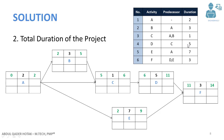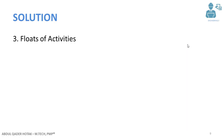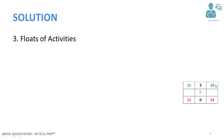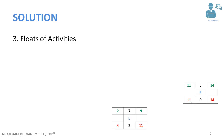Now let's go to the third part: calculate the floats of activities. In the previous step we did a forward analysis to find early starts and early finishes. To obtain the floats, we do a backward analysis to find the late finish and late start of each activity. For activity F, the early finish is 14 and the early start is 11. The activity cannot be delayed beyond day 14, so the late finish is 14, and subtracting the duration gives a late start of 11.